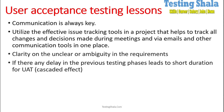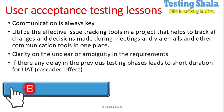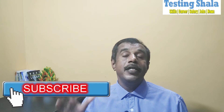We also have system testing and regression testing. If any of these cycles get delayed for various reasons, your start of UAT will also get delayed. When it gets delayed, a lot of pressure will happen and stakeholders will want to squeeze the timeline, which causes a big mess and big challenges.